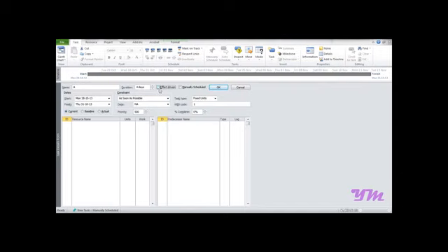And the third very important point is that task type should always be fixed to Fixed Duration, because when we do any other function such as leveling, or play with some function with resources, it will alter the duration of the task, which we don't want. So always select Fixed Duration in this case.